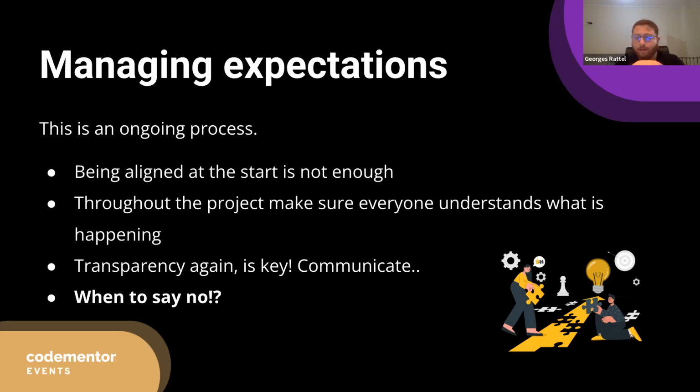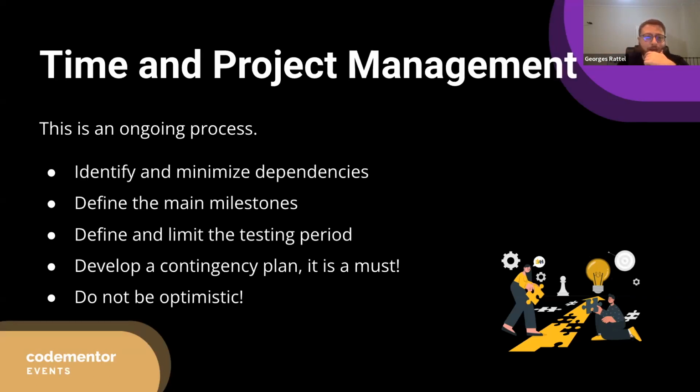You can agree with the client from the beginning that no changes will be accepted, or you can agree with the client that changes will be accepted, but every time there's a change, the budget will change and the timing will change, or other terms. It doesn't really matter what the terms are. What really matters is that you make sure you can deliver and commit to them, as well as the client, him or herself. Okay, so moving on.